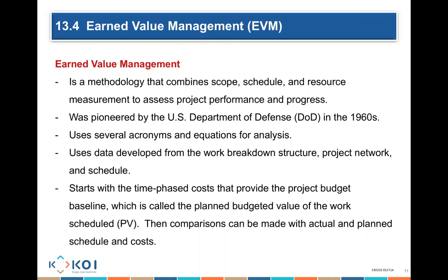It was pioneered by the US Department of Defense, uses a number of acronyms and equations that we need to go and analyze, uses data developed from the work breakdown structure, project network, and schedule, and starts with the time-phased cost that provides a project budget. Now, this is the example I showed you earlier. Week 1, week 2, week 3, week 4, week 5, week 6.